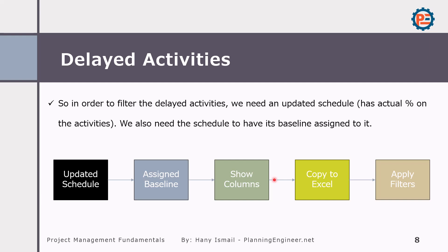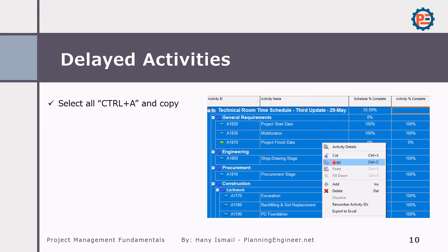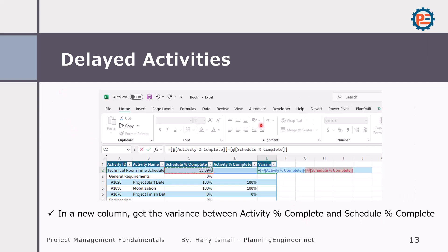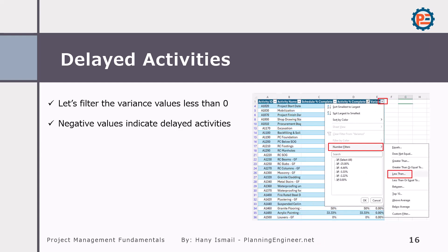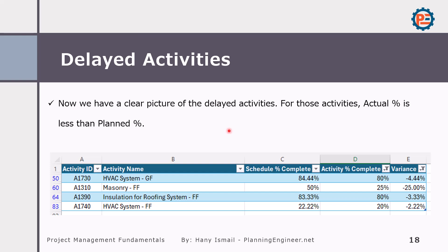You will find a link below this video to download the practice file so you can import it into Primavera P6 and follow these steps. If you don't remember how to import schedules to Primavera, please check the import and export video. After we open or import our schedules, we should show the schedule percentage complete and activity percentage complete columns. Then just right-click and copy. Go to any empty Excel sheet and paste. Press Ctrl+T to convert the data into a table, then add a new column to calculate the variance — which is planned minus actual. You will have a variance column and you can apply a filter on the variance to see negative values, or use number filtering set to less than zero, and it will give you the delayed activities. Let's go and see how to do this practically in Primavera.